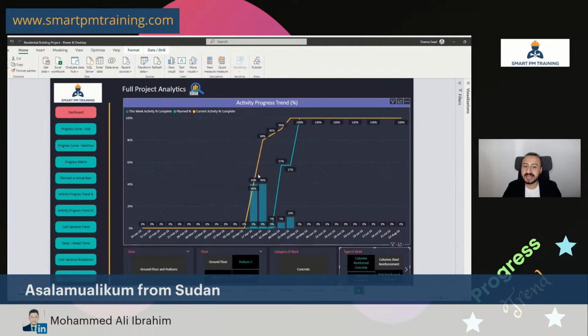So when we look at trend analysis, it means we can say something like that. We completed the activity ahead of schedule, but we have a slow rate of progress. It means that if we continue with the same rate of progress, we're gonna end up with delays in concrete. And you don't want to wait until this happens. Why? I am glad that you asked.